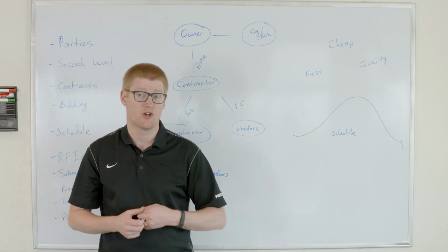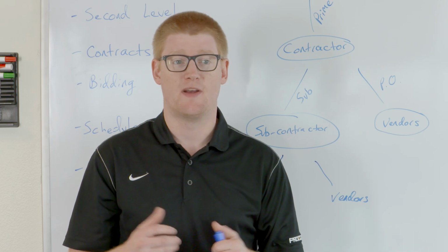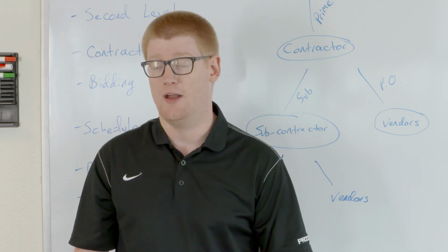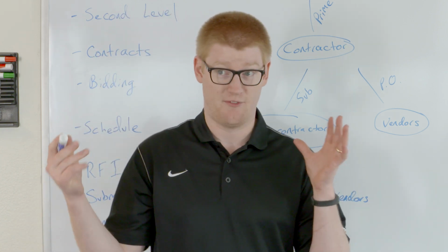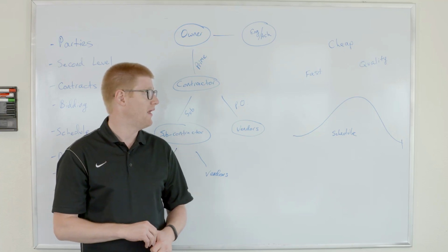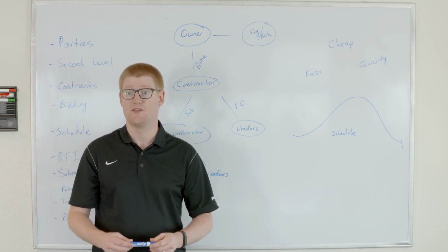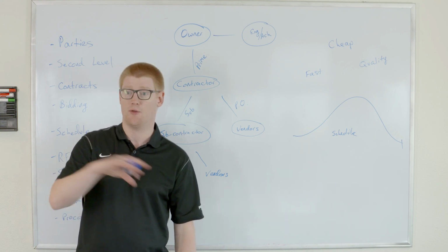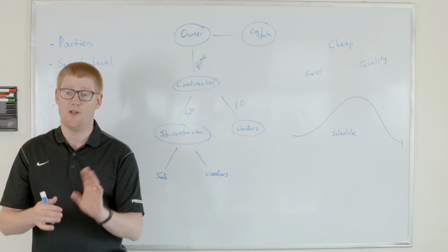If this is a two-year construction project, knowing where your dates are at really matters, especially when you start having things like chillers that may not be able to sit outside in the weather, and yet they take a long time to construct. They may be specific for that building. A large commercial building may have a chiller built for that building. And so it may have a three-month lead time where it takes them to construct that and deliver it to the job site. And you have to be ready. The floor's got to be ready for it to come in. And as soon as it's in, you've got to put the roof on so it doesn't get weather on it. So it's really important looking at a schedule and planning all that out.